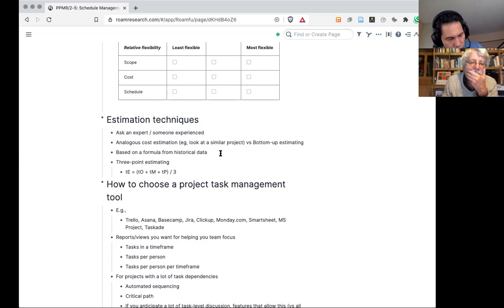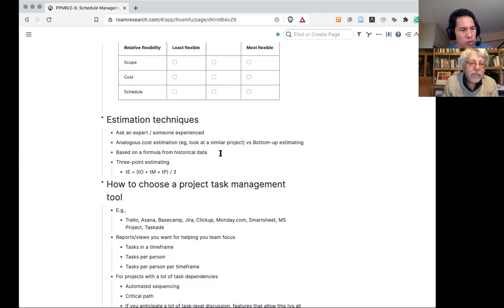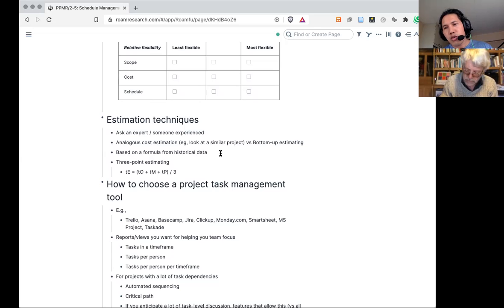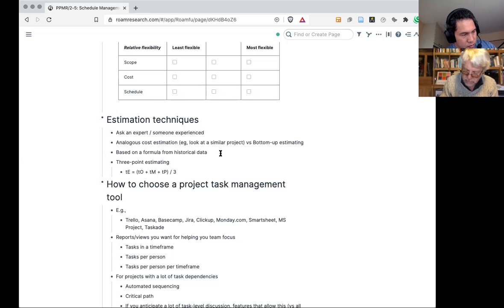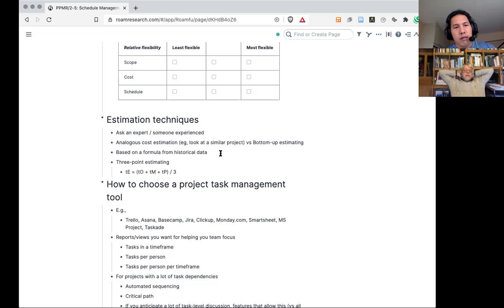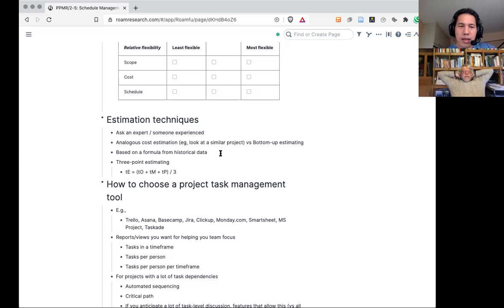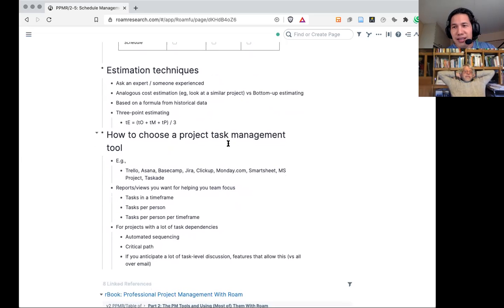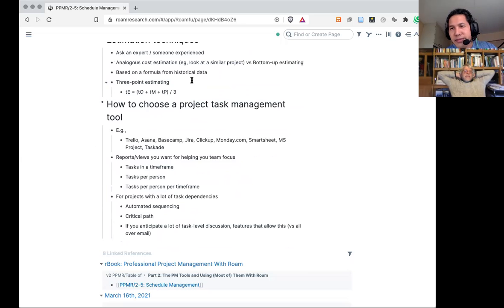Historical data formulas are more applicable to things that have a predictable outcome in terms of project duration — for instance, how large a building is is pretty correlated to how long it takes to build. For an experienced company that does a certain kind of project, they could predict how long a project takes based on certain inputs, maybe square meters for a specific type of building. I've never personally done a project with this kind of parametric estimating.